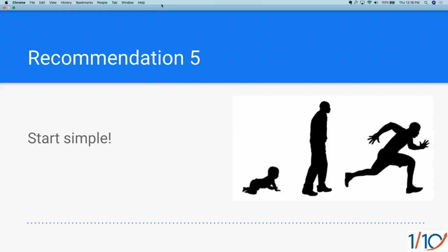But the advantage of this is, for one, you're making smarter decisions as you go along. You might have a vision of what you need and can spend thousands and thousands or hundreds of thousands of dollars in that first phase. But after you use the system, you have a different understanding of it. So using the system more gives you the ability to think of what's the best thing I need, what's the prioritized thing I need, and then focus on those in small phases thereafter. In the larger scheme of things, it will be more economical.